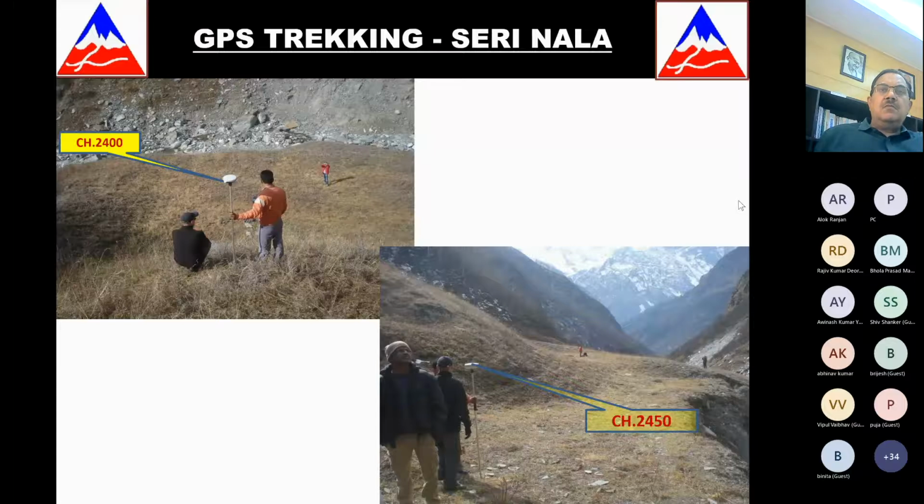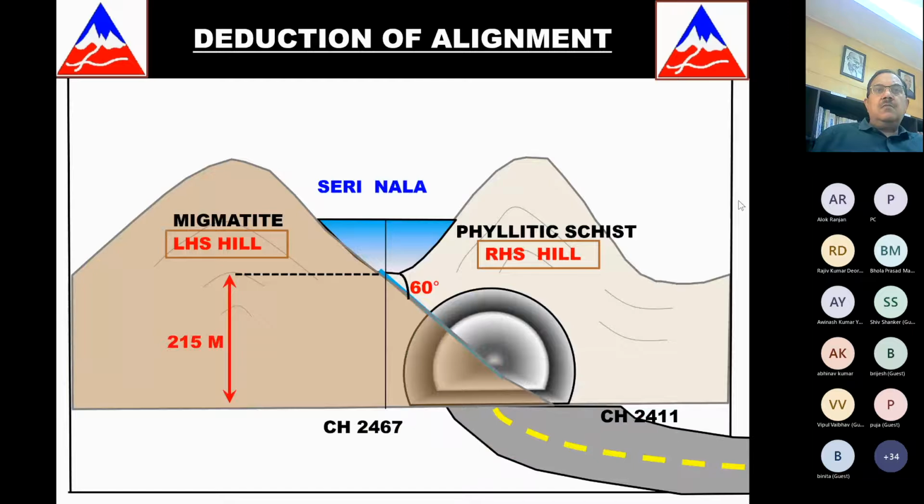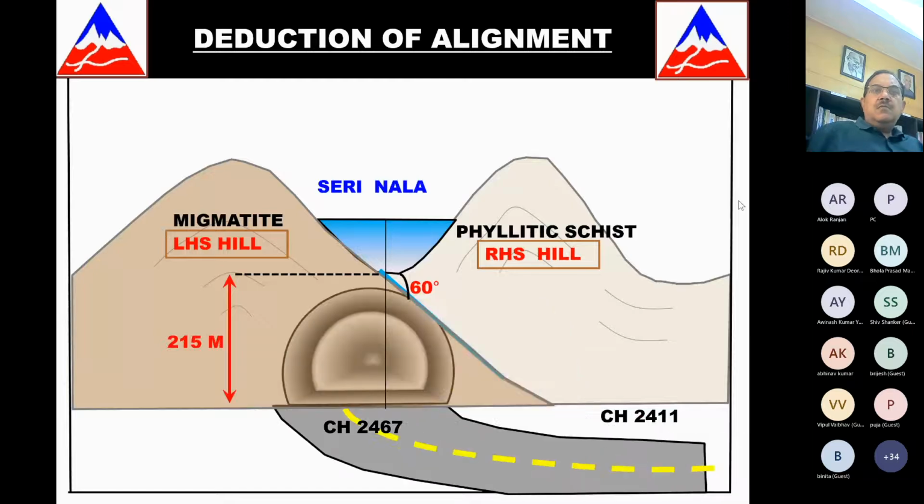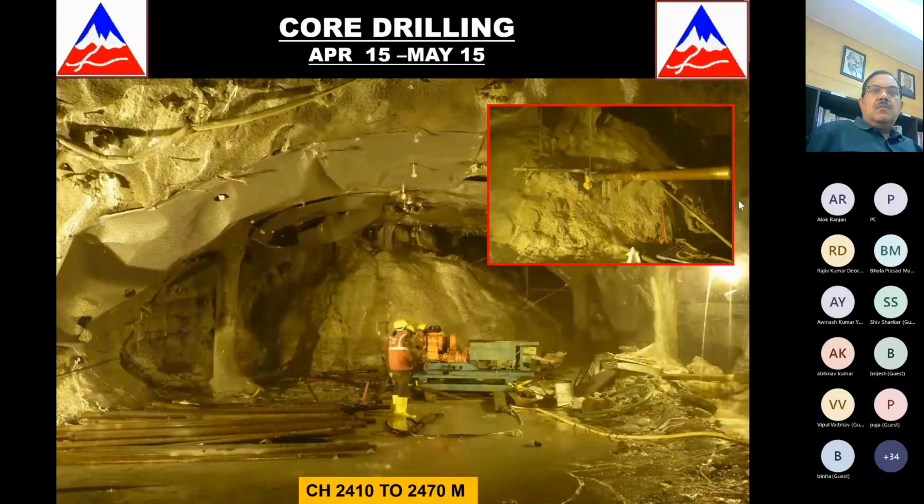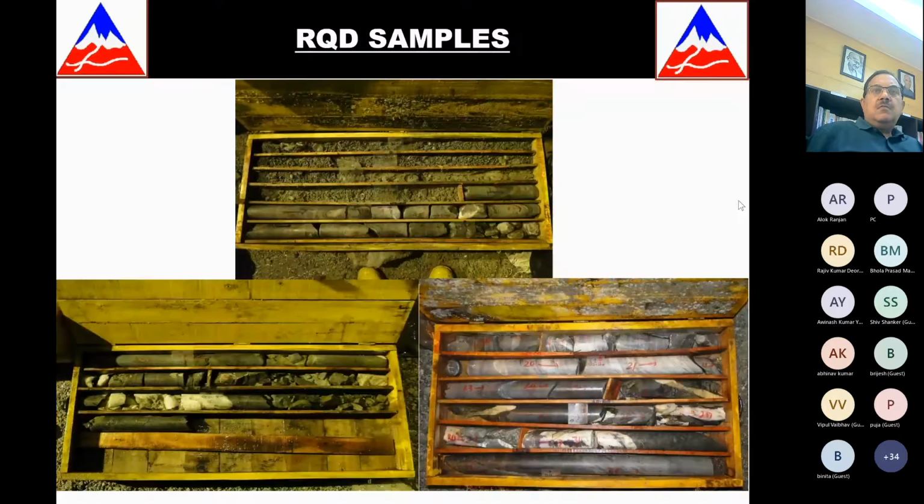And we, as the Border Roads Organisation, persevered that we will not change the alignment and will still go straight. We did an analysis that after another few meters we will get better rock, and we also did face drilling to keep checking our assumptions on whether the rock was improving ahead. And finally, it was after about 580 meters that we started finding rock ahead.